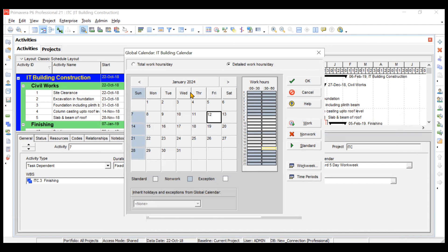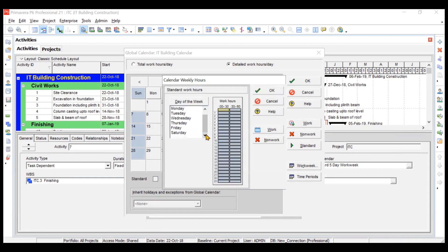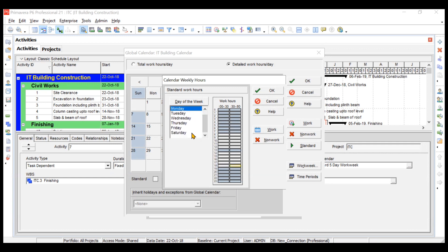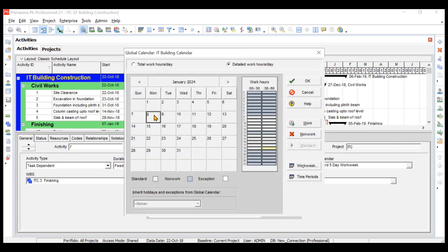After the one-hour break, work continues: 8 AM to 6 PM with one hour break gives 10 working hours. However, this change is only applied to the specific date you edited. To apply it to all working days, go to Work Week, select all days, make the same hour adjustments — mark the start as non-work and set work periods accordingly — then click OK.